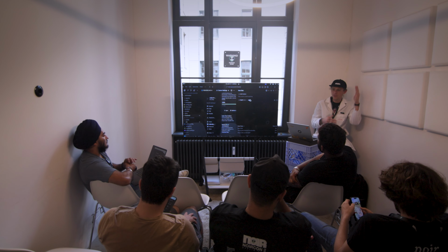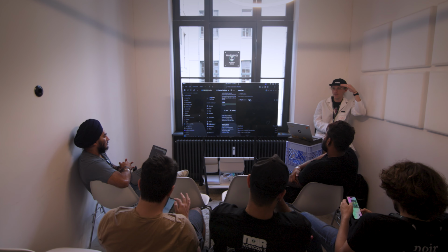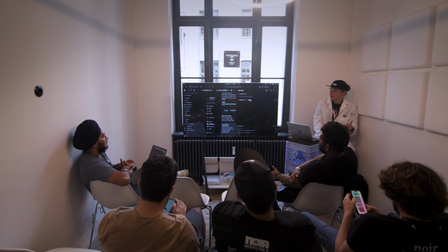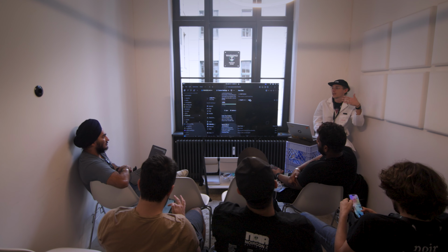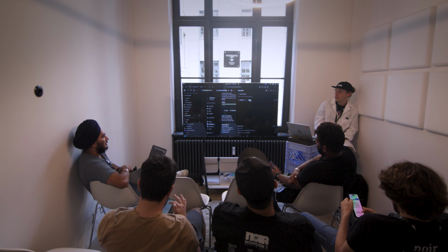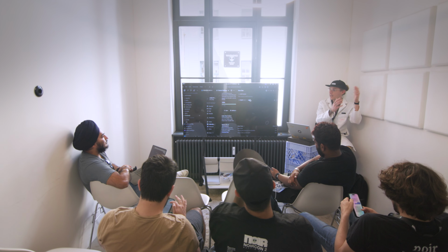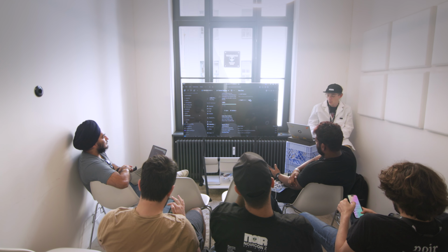If it's too complex, it breaks it into subtasks, and it makes sure its complexity is below a certain threshold for it to actually be able to execute. For example, it needs to be below complexity level 8 for a Claude 4 Sonnet to be able to execute it effectively, or something. So it does complexity analysis. If it's too high, it makes subtasks, and each subtask will be less complex.